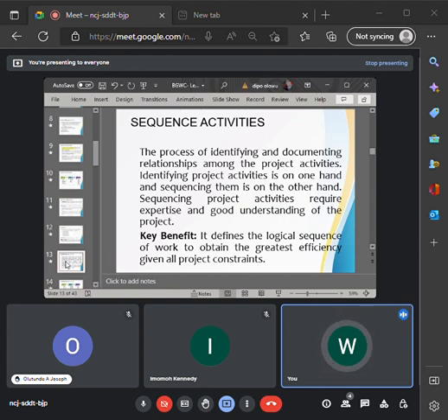Okay, so that is it about defining activities. Defining activities is in scheduling, while WBS is in scope management. Take note. When we talk about defining activities, is it just the project manager that will sit down to define the activities? No. It must be the project team. Take note. Why do we have to involve the team? Involving the team helps define the activity completely and accurately. Therefore, it makes the estimate more accurate.